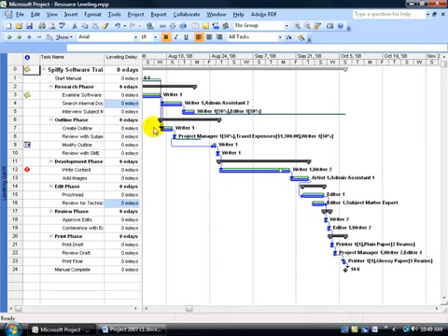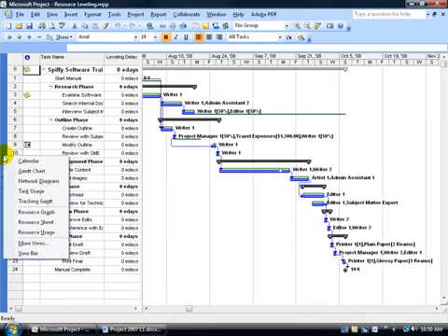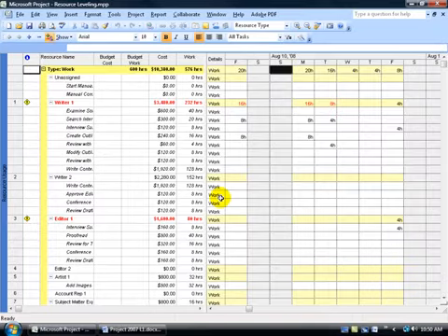And more to the point, you can see when you cleared the leveling, remember we had 5 elapsed days, I believe it was here, then 4 down below. They went back to 0 and 0. And then when you click Save, Project assumes that you noticed the changes here and it clears out those highlighted or selected cells. And then of course, because you haven't leveled the overallocated resources, if we go back and right click on the collapse view bar, go back to the resource usage, we're back to overallocated resources.